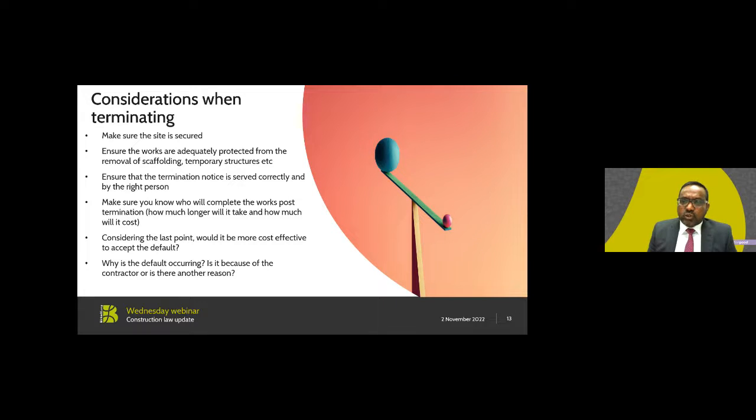Where a party has a choice to terminate the contract or affirm it, termination normally requires a clear, unequivocal communication. That is, a party must communicate that it is terminating the contract. A letter threatening to terminate if payment was not made in the next 2 days does not terminate the contract.